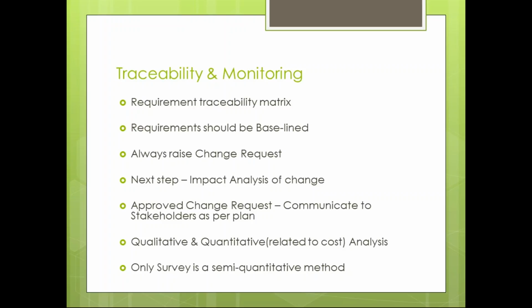So the next step would be impact analysis of the change which is requested. Always the next step would be impact analysis. It might be confusing whether to do the impact analysis first or raise a change request first. Impact analysis always comes as the second step after the change request is already raised. So you need to understand in the questions whether the change request is already raised or not.